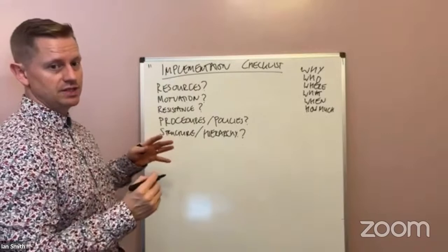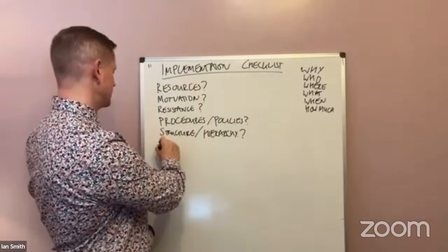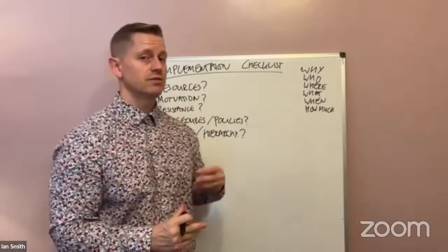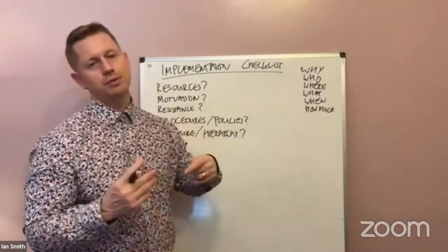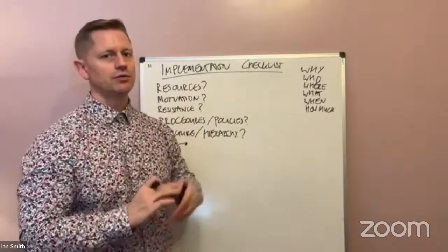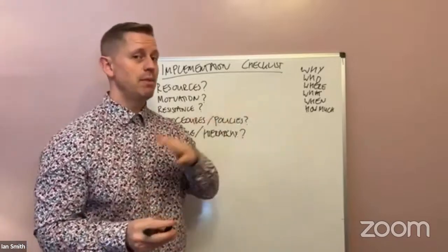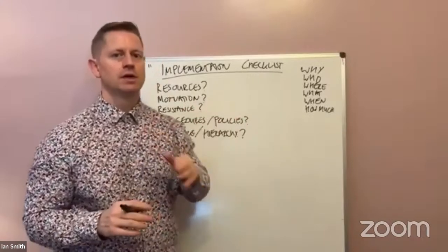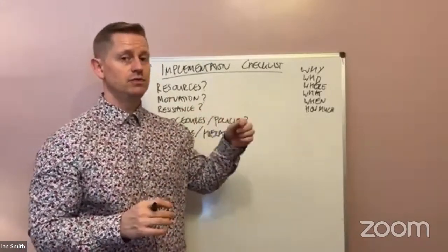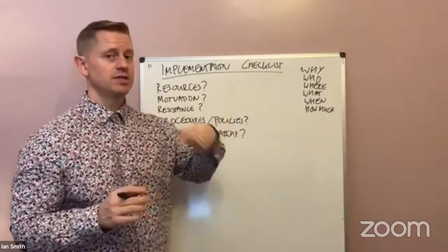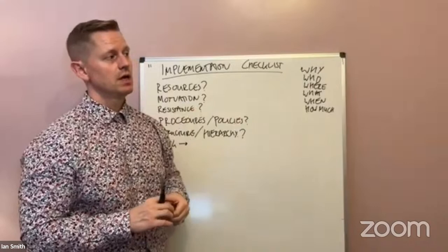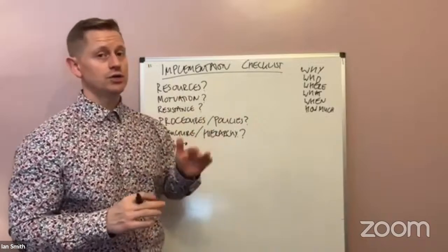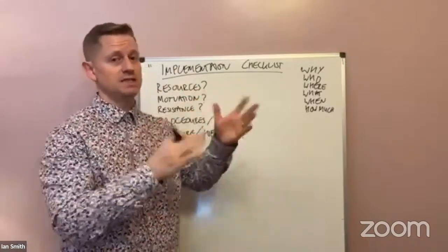Now, the other element to this is also to understand the level of risk. So what's the level of risk in terms of the actions that you're taking? Now, in purest project management form, you will have done a risk analysis, you'll have assessed impact, you might have different impact factors, you might have systems, people, budget, for example, and you can weight them as to how, if the risk is proved to be an issue, and it's been made tangible, it's coming to fruition, then you can allocate the weighting in terms of the impact to those impact factors. Or you can just say impact and probability. And probability is the same throughout.